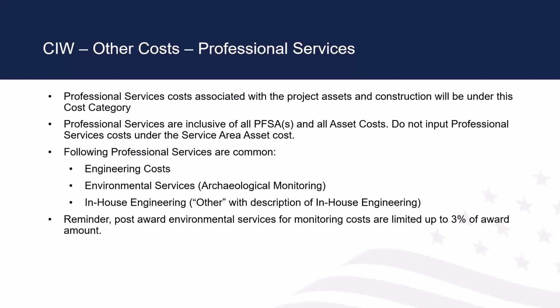One thing I want to touch on here is in-house engineering. You need to make a clear and distinct description if you're using in-house engineering and expect to be reimbursed for that. You need to have that described explicitly in the other costs. Next slide, please.